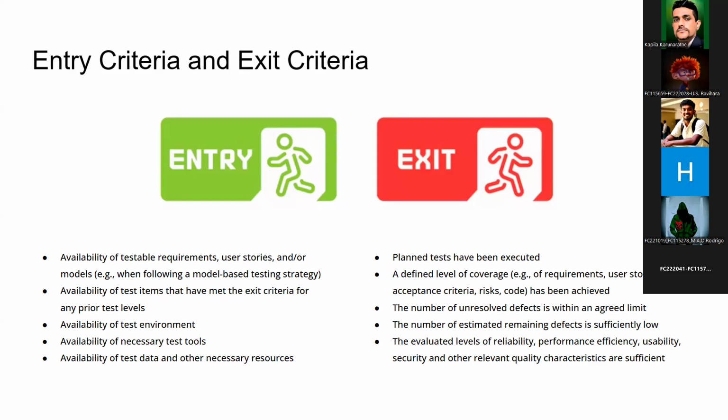then even though you have 100% execution rate and a 95% pass rate, if there are still open critical and high issues, you can say until these critical and high defects are fixed by the development team and retested by the QA team, this is not ready to go. You can stop the release because you are the people who govern the quality in different aspects, right?